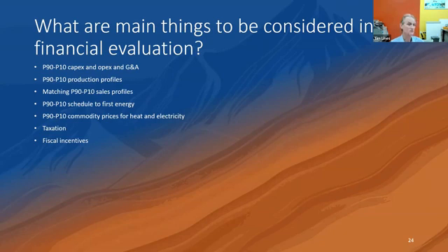So the main thing is make sure you cover the full waterfront of uncertainty with everything you do, and how you then decide to combine those uncertainties. If you do 3 deterministic P90s, you're probably looking at a P99 outcome because the probabilities are independent. But somewhere you've got to be producing economic evaluations that have some sort of a bell curve or some sort of a range among them that is credible, so that your board know where they want to put their risk reward marker. What are they prepared to invest in?